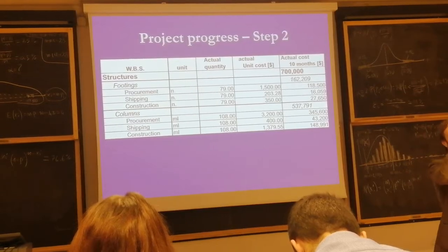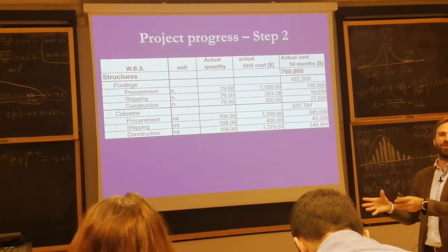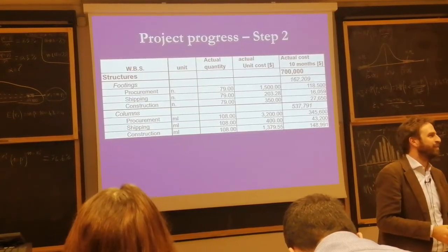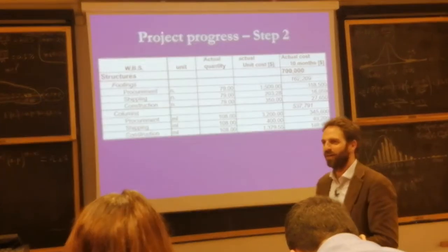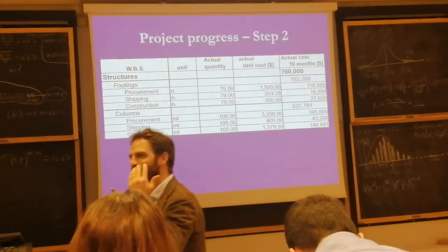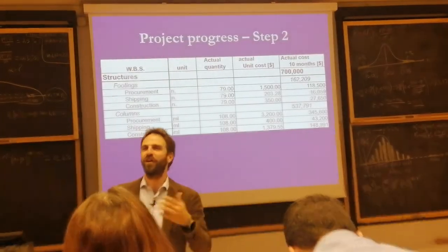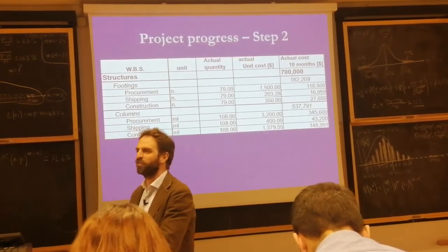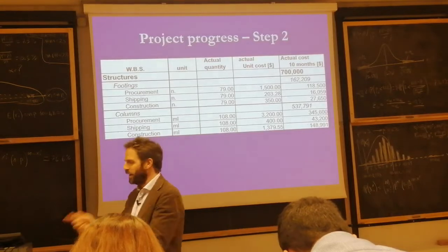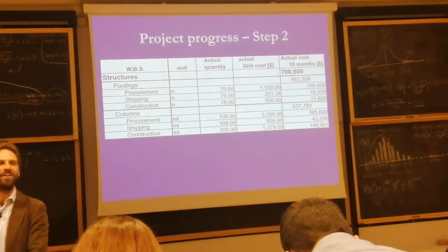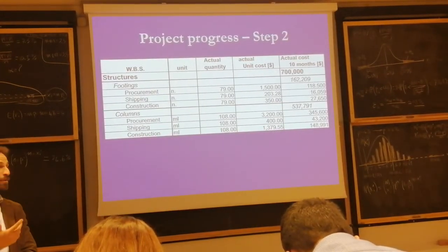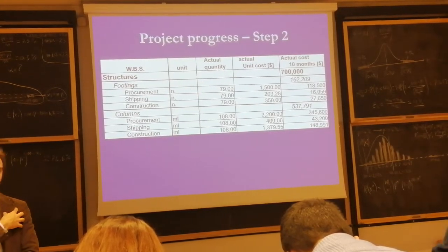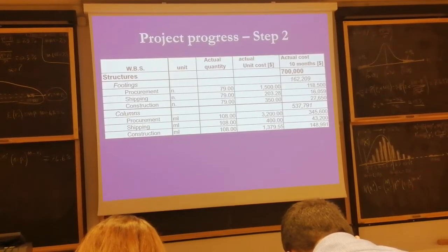We just made estimates, and now it's time to pay our supplier, and the supplier says, my price is 1,500 and not 1,400 because it's very expensive now. It's 10 months after the budget. The raw materials cost have increased due to inflation. You didn't force me to write a contract at that time. Now it's time to make the contract. It's 1,500. Bingo, right? I'm earning more money, and as a contractor, I'm spending more money. At the end of the day, we're spending 700,000.